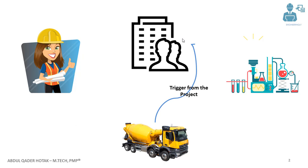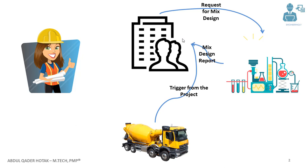The company might check the schedules and see that an activity, including concrete pouring, is approaching. So what the company will do is send a request for the mixed design to the laboratory. The lab, after a while, will provide the company with the mixed design report.